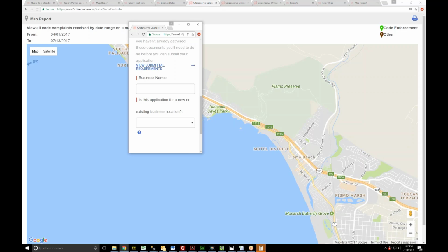You'll say, hey, I like that, or if we're going to do it that way and that makes sense, can we also get a report here, or let's change that field type to a drop down with these specific values in it. Then we'll make those changes during the week, and during the week you also have the chance to log on and play with the system. Let's say it looks good during the meeting, but after you did a couple of them, you think it would be better to do it this way. We'll make those changes, and you just bring that feedback to the next meeting. We keep iterating through the process until it's the way that you want it.